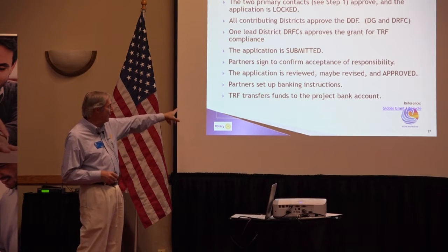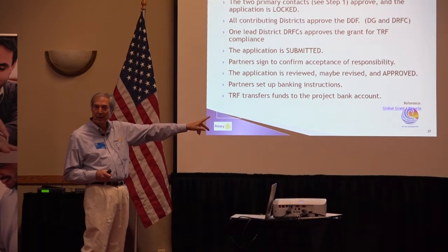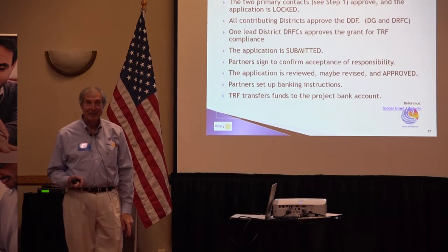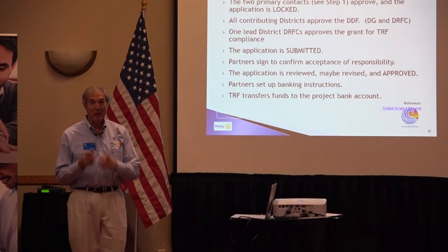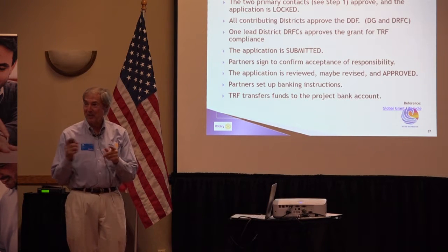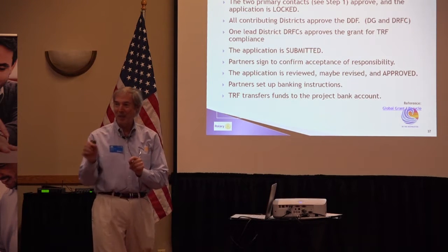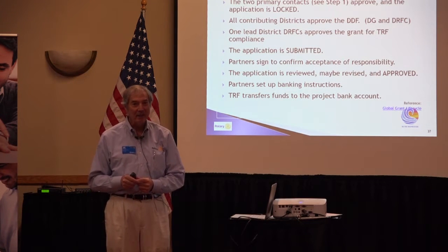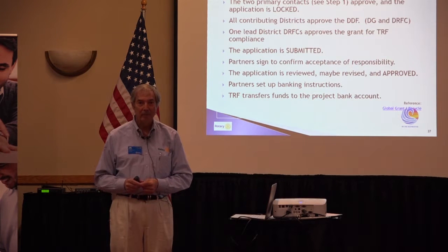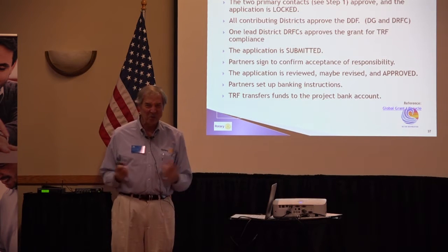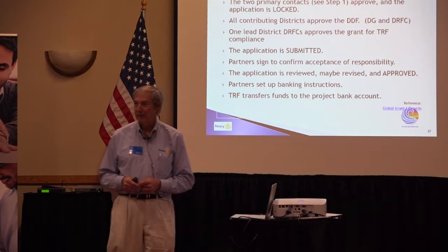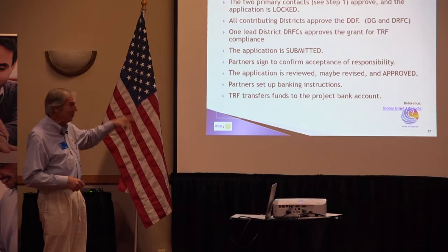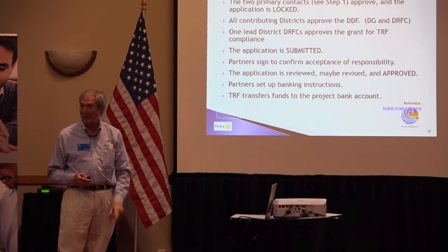You got to set up banking instructions, and they send money to the bank account that you've set up for the project. If you don't do that, you've only got a window of, I think, 6 months. If it doesn't get paid, that's what happens when they send the money to your account. If it doesn't get paid within 6 months, they can cancel the whole thing. I guess you weren't ready. You weren't really ready to do this if you don't ask for the money. So you got to be ready to do this, and that managing all of this is something that you want to put on your little plan too.